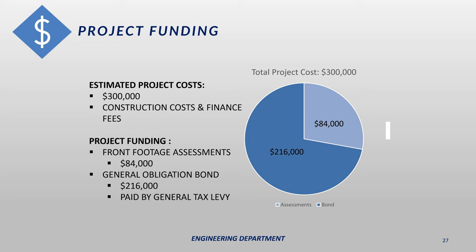When the city does projects like this, we typically get a lot of questions related to funding. We've estimated that the project will cost approximately $300,000, including all costs associated with construction as well as financing fees. The funding comes from two sources: special assessments and general obligation bonds. Front footage assessments are expected to generate approximately $84,000 — roughly a quarter of the project cost. The remaining $216,000, roughly three quarters, will be funded through general obligation bonds that the city obtains on the open market, paid through the city's general tax levy fund.